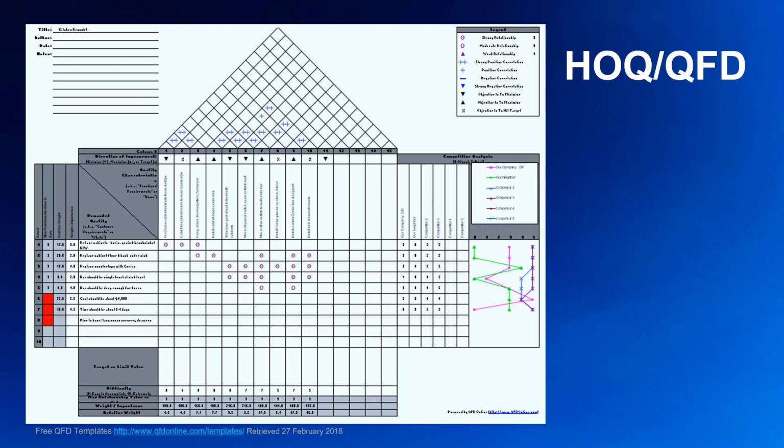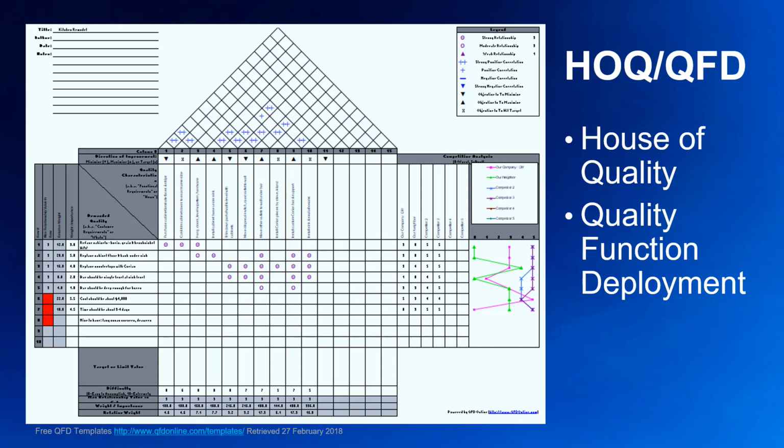And now for this here. Here we have an example of a chart mixing several matrix diagram shapes. This is sometimes called the House of Quality chart because of the inclusion of the roof-shaped matrix. The chart is based on a method developed in Japan in the 1960s called quality function deployment. The original objective is to translate what the customers say they want in terms of quality into functional requirements, or what we want versus how we need to get it done. With such requirements and features, it is like a requirements traceability matrix on steroids.